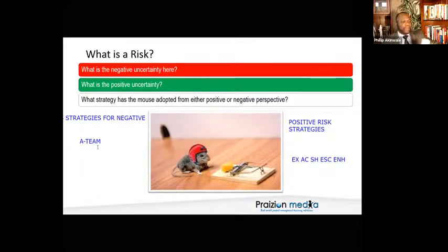So you need to be very comfortable in identifying when someone is not doing anything before the risk happens. It's accept. Here's $1 million. So what? You're not using it now. You're using it after the fact. Accept. But active accept. Oh, here's a plan B. If the risk happens, then we'll do this. Accept. Active accept. Here's $10. Active accept. Oh, just forget it. If it happens, it happens. We're not putting any money aside. We're not doing anything. Passive accept.